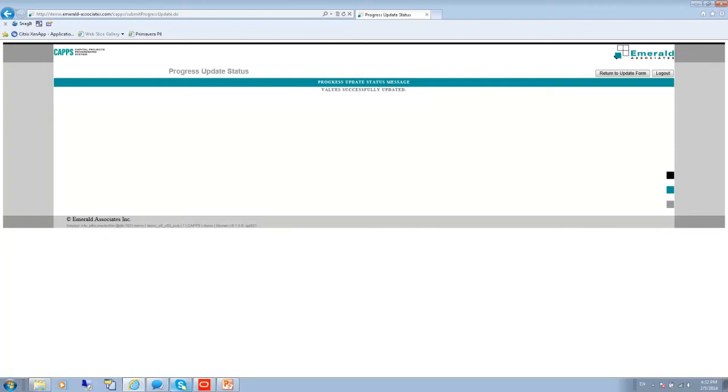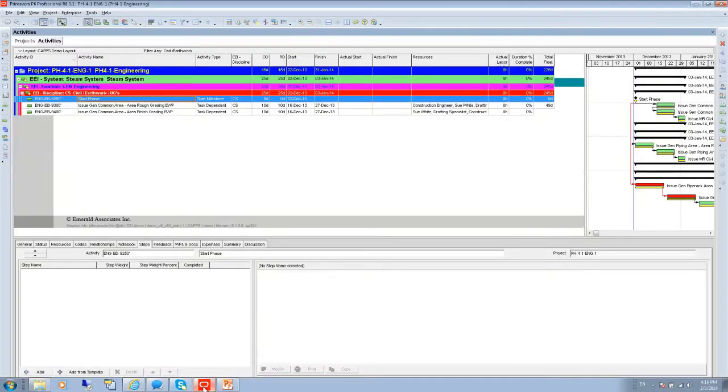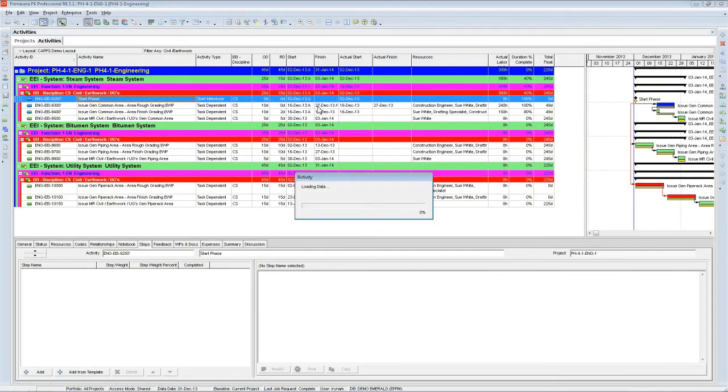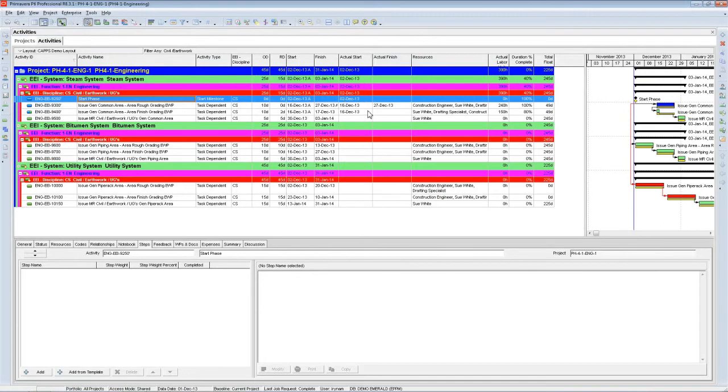And I can go to Primavera, to P6, and hit F5 to refresh my screen. And you can already see there are some actual dates in the schedule.